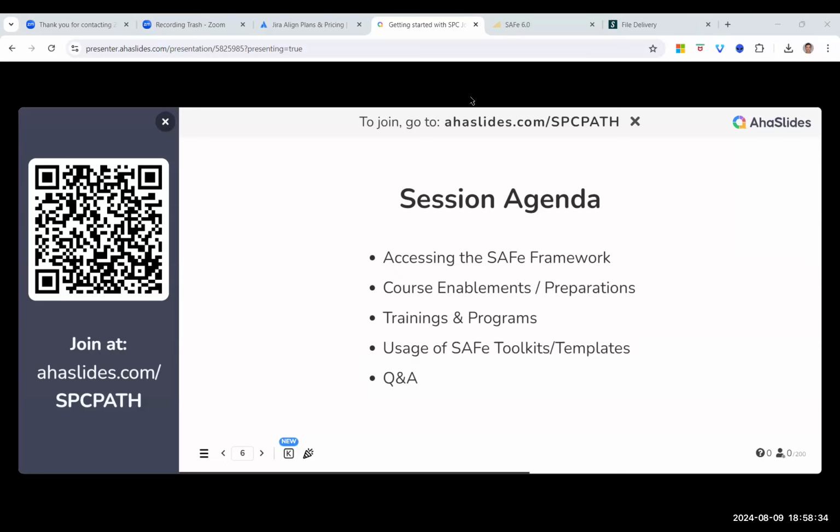Okay. So Jira hygiene, more than the SAFe perspective, we have our own organization-specific guidelines defined. Like we define our own sprint naming convention. It should be like 2024 PI3 with either the release train name or the team name, and Sprint one, Sprint two, Sprint three, like that. So we have defined our own guidelines or standards from the Jira perspective. Same for the other things as well.